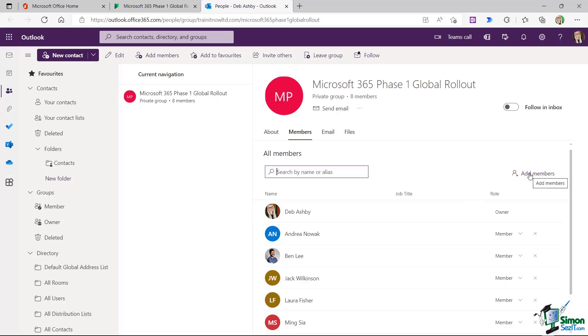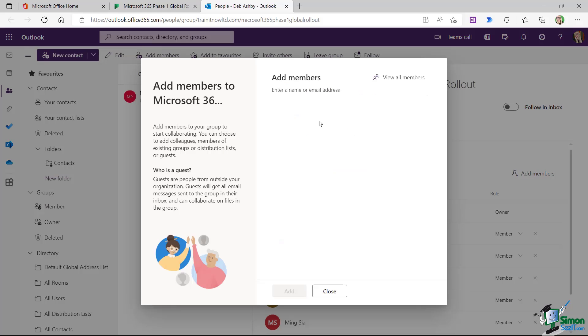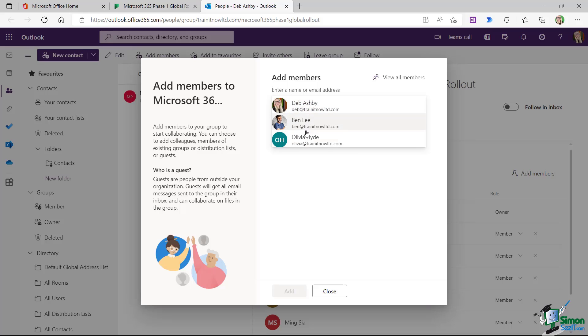All I need to do here is click on the add members button on the right hand side. And once again, notice that if members are part of your organization, they will pop up in the list below. But if we want to add somebody external, then we need to type in their full email address.